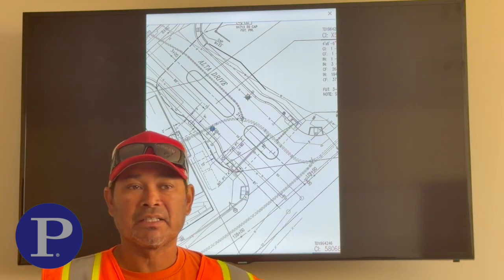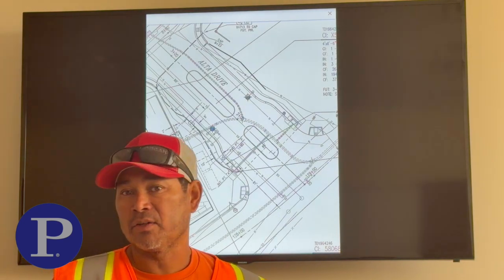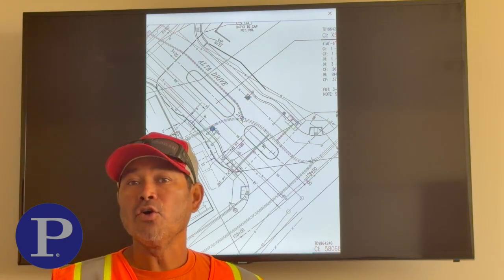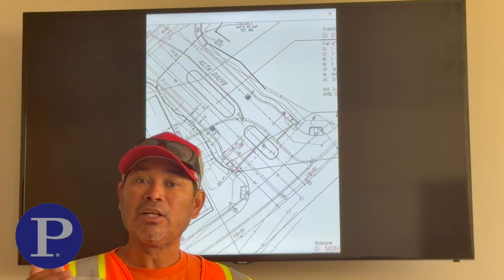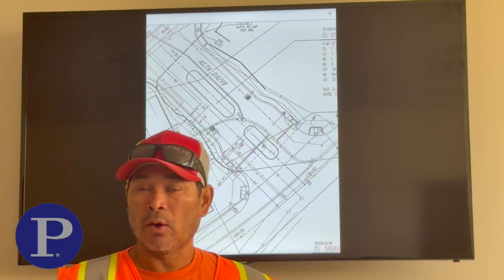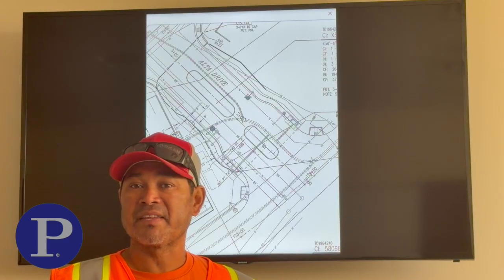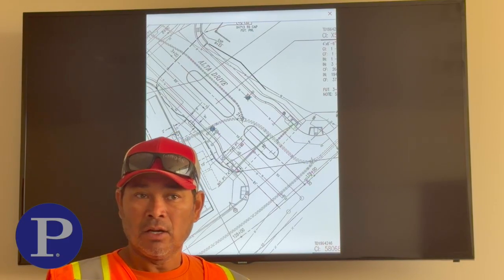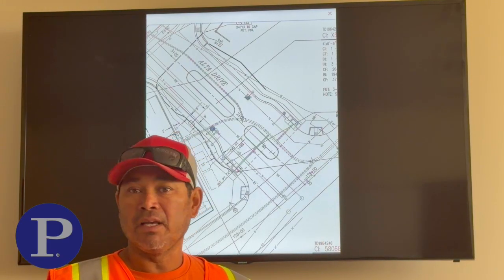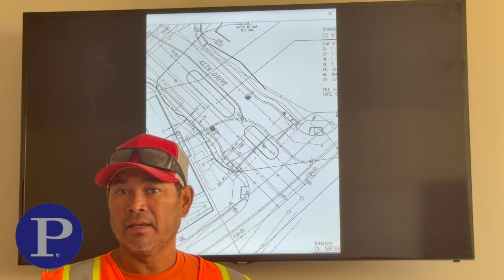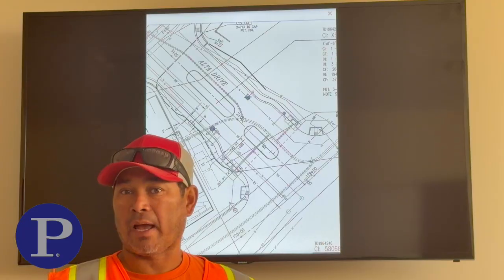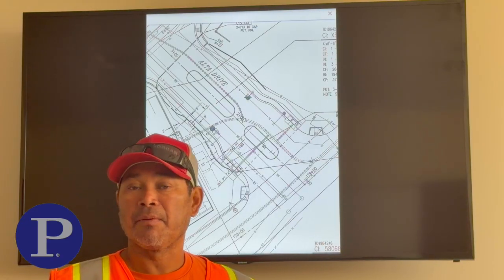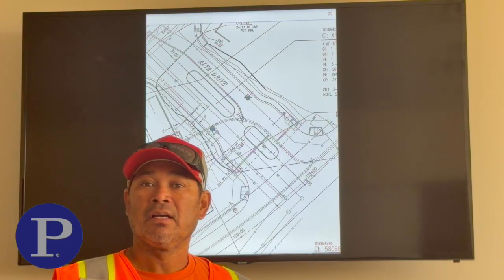So when you order materials, my recommendation is that you don't order 100% on the first order. Just order a little bit short, and that gives you a little bit of time to understand the many obstacles you have in your way. That way you may add or retract from the linear footages because you're going to use more angles.